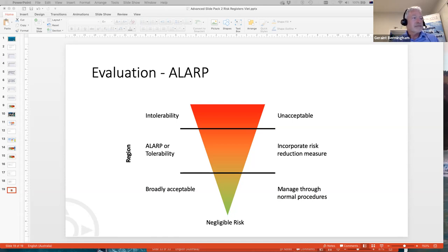Well, what I'm suggesting is that maybe the manual ought to make it clear that even if it's an acceptable risk or tolerable risk, that doesn't mean you should just be comfortable. You should still try and do more, so that the overall level of risk to the organization is constantly being pushed down, made better. Anyone disagree? No. We do agree. So that's the thinking behind ALARP, as low as reasonably practicable. Have you taken all reasonable and practical steps to lower risk more?